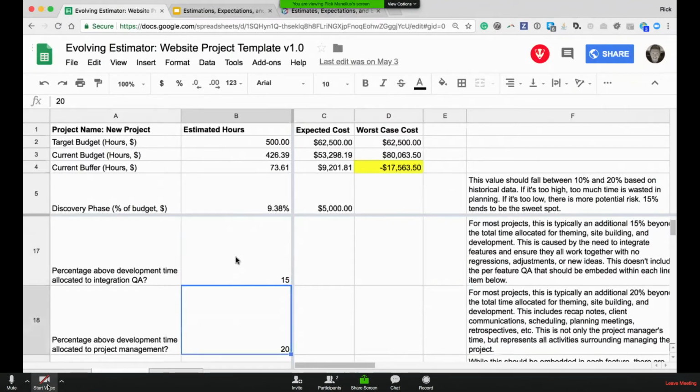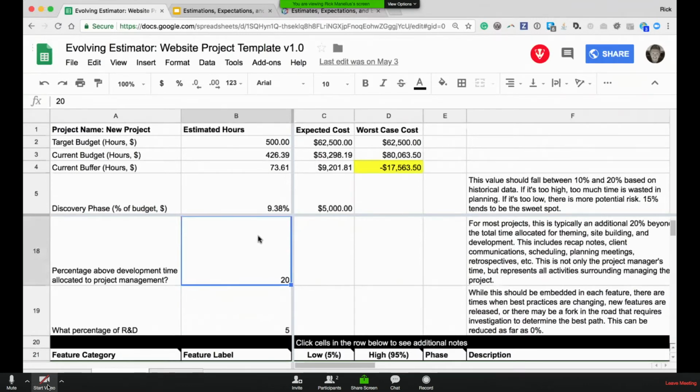These questions I love because this really could be an eye opener for clients because when they have a budget of 100 hours maybe of your time, there's this sort of wish, this hope that all 100 hours are going to be in development and design, that literally every hour is going to be spent on an effective delivery of value. When in reality, integration, QA, making sure all those features come together, just managing the meetings, the scheduling, the coordination, and all those things, running sprints and so forth, they take time. And by surfacing this up front as like, look, this will add 15 to 20% overhead, because we're a team size of 5, it just gives them more clarity and more expectation of this.